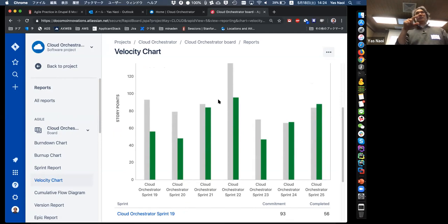So story points go 1, 2, 3, 5, 8, 13, and 21-ish. If we put the largest story point, like a 21, it's kind of a signal that it's dangerous. It's very huge for the task.